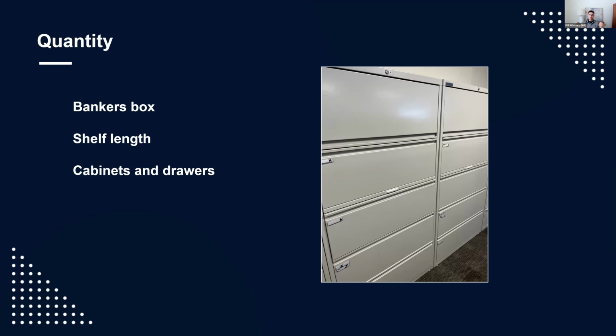And actually, I don't know if we said it before, but for a banker's box with some folders but basically just loose-leaf paper, you're roughly looking at about 2,400 to 2,500 pages, which is clean material. That will increase if you really stuff it. It'll decrease if you have more folders and binders and things of that sort. But a good rough number is about 2,400 pages per standard banker's box.